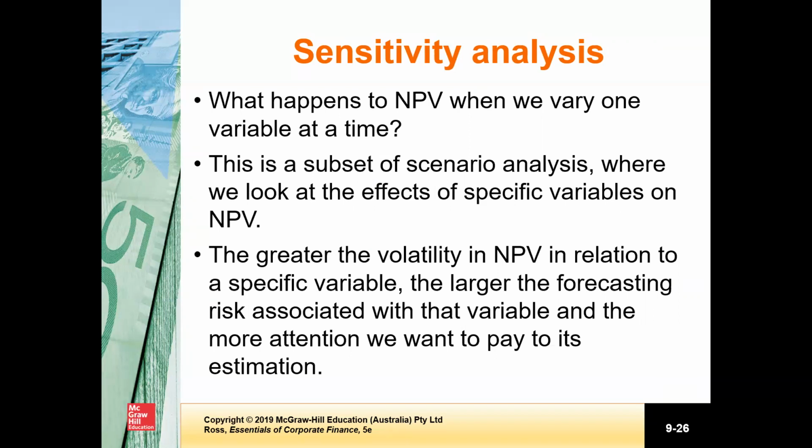Keep in mind that the major difference between a scenario analysis and a sensitivity analysis is that in a scenario analysis, we consider a whole scenario. For example, an optimistic scenario will have higher price per unit, lower cost, lower fixed cost, and higher market share. That is a whole package that makes up a scenario, worst case or best case.